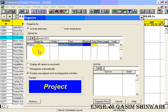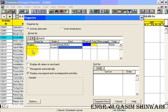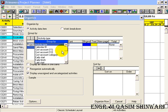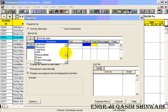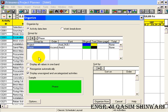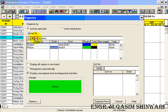Here let me make some another groups. For doing so either press on, click on add icon or click here. Highlight Group by and select Phase. You can actually select the order, either it should be in descending or ascending. In this case leave it as it is.